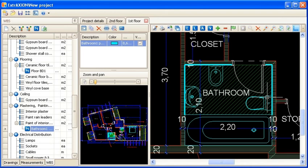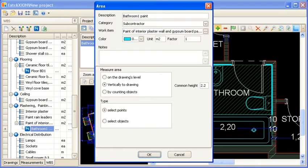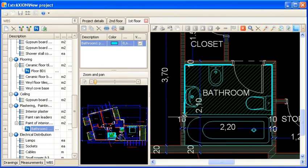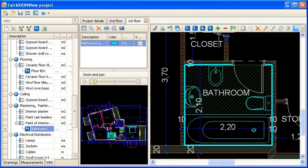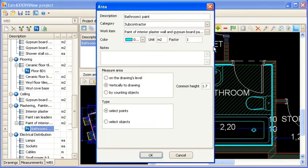You can continue a selected measurement by clicking on the Continue Measurement button. In this example you can continue the measurement by adding the parts above the bathtub by changing the height accordingly. You can do the same for the part above the door, adjusting the height again.